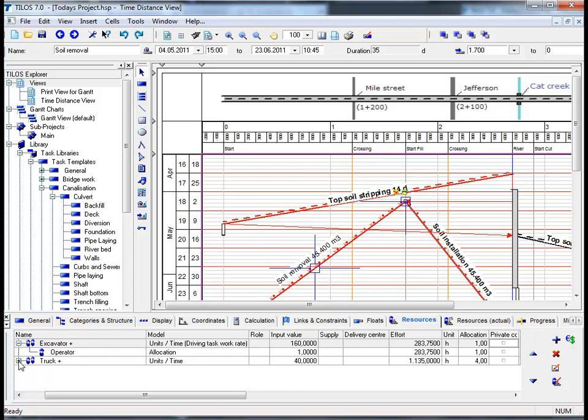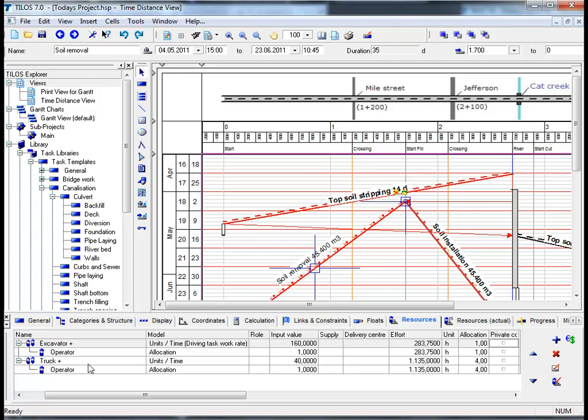If we go into more detail by clicking on the excavator and then clicking on the truck we can see that with the excavator it is a complex resource as the excavator and the operator are both assigned per hour to this task. The truck is calculated by unit and time. This means how many units can the truck carry away per hour.